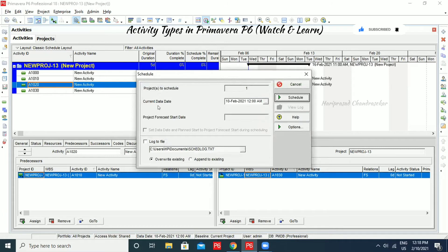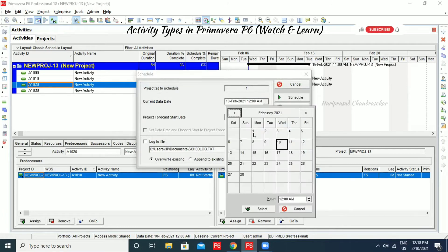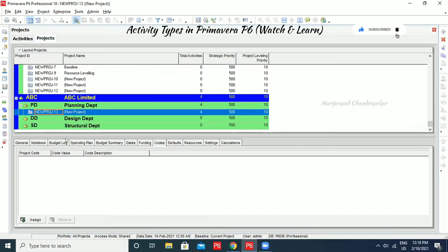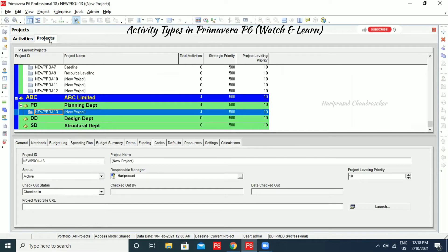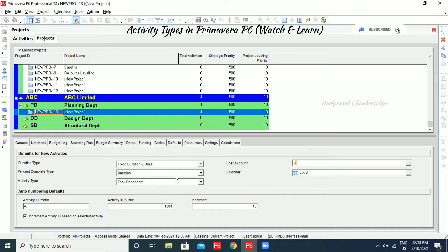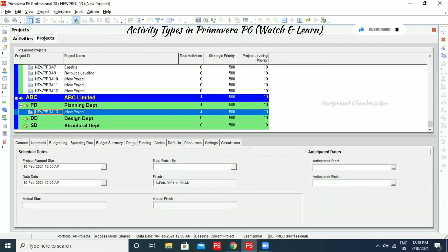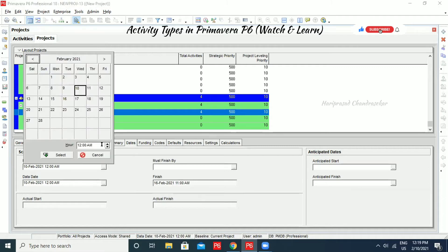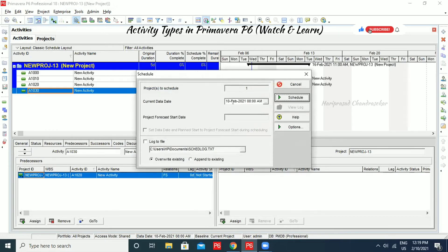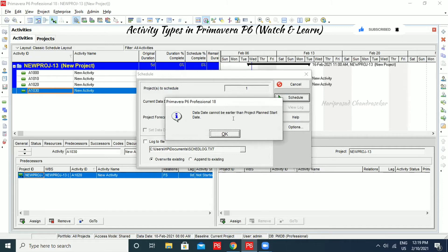I'm going to put Schedule and it is taking the current data date. The data date can't be earlier than the project planned start date. I'm selecting February 1. We must check the project start date — in Project, in the detail window under Dates, we have the project planned start date. It is set to the 10th at 12 AM, so I'll change it to 8 AM. Then we can go for scheduling. We can't schedule because the data date cannot be earlier than the project planned start date.